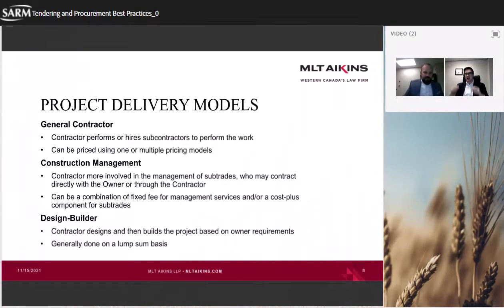I mean, the trade agreements are inherently about fairness and open procurements. And I think, to the extent RFQs that I've ever seen them done above the trade agreements, they kind of went hand in glove with a pre-qualification process that was open. Yeah. So typically that's how I would maybe see it, that if the question ever comes, well, was this fair? We whittled down our list and then we asked the people on the list for the price.